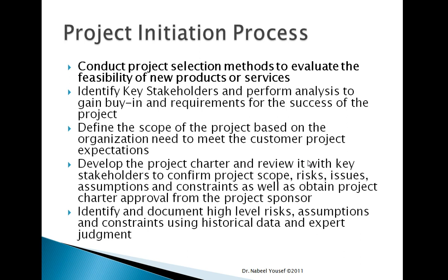Those are the risks, those are the issues, and we are assuming that this will be available or this will not be available. We can add boundaries and constraints, so everybody will be on board with what's going to be delivered at the end of the project. And the fifth activity will be to identify and document the high-level risk assumptions and constraints using the historical data, the expert judgment, and the verification that we did with the stakeholders.